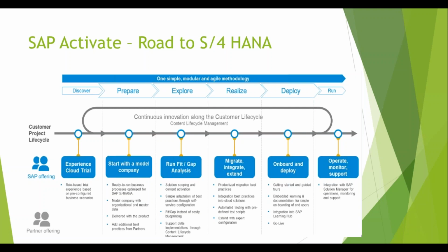Once you get the business blueprinting sign off, you enter into the realization phase where you actually start working on the configurations, and if any Z developments are also required, you start working on those. Once you complete that, you enter into the final preparation where you perform different kinds of tests. You create the cutover data plans, testing everything from the user point of view and integration point of view. All those tests and cutover plans are created in the final preparation, and then you decide one date and you go live.